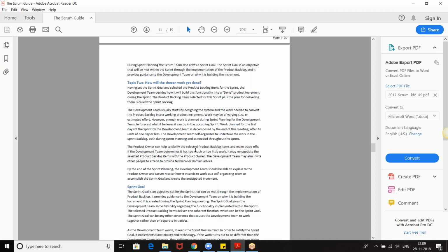Item 1 and 2 are fine. They are ordered the right way. But between 3 and 10, I want a few things first. That could be one of the ways, or there could be a scenario where the dev team might tell the product owner, hey, this designer is going on leave, so we can't get this work done now. This work is dependent on him. It is ordered third in the backlog, but we can't do this now because he's going on leave. So can you please reorder it?